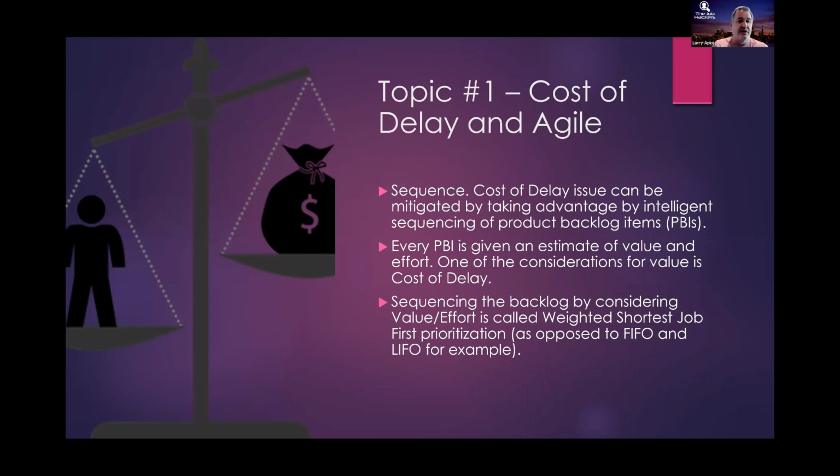What did we do? Well, we talked about value and we talked about effort. And if you go back in your memory banks to day 2, when we talked about sequencing the backlog, we did 2 relative estimation exercises. We asked, what was the relative effort of the work? And the relative effort is a proxy for duration, okay? In that CD3 equation, cost of delay over duration.